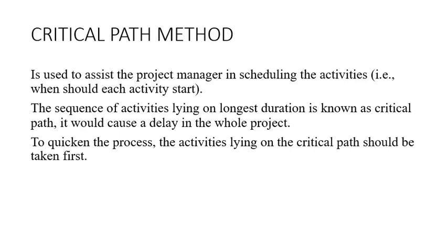This particular method calculates a single deterministic early and late start and finish date for each activity based on specified sequential network logic and single duration estimate. The main focus of CPM is on calculating float in order to decide which activities have the least scheduling flexibility.